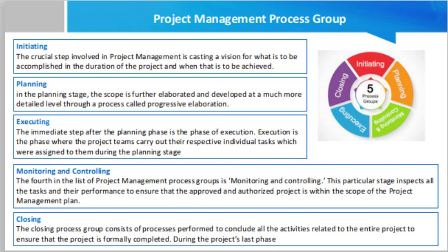At last, the project manager should properly close the project by archiving records, conducting lessons learned sessions, finalizing payments, completing contract closure procedures, releasing the existing resources, and handing off the completed product. The project manager has to ensure that lessons are learned and the historical information about the project is centrally archived and stored so that it can be used as inputs for future projects instead of going through the entire process again.